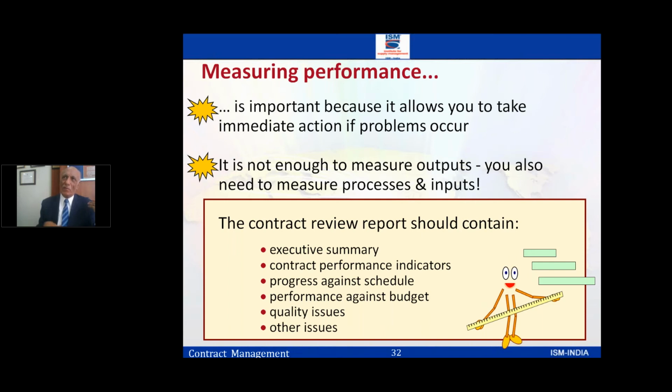So you need to have the performance indicators. Against those performance indicators, you need to measure how this guy is behaving in regard to the price rising up and down, in regard to the delay. The delivery was supposed to happen in 2 weeks, it happened in 4 weeks. Quality, I will look into all aspects, whether they were supposed to give us 20 pieces and the guy gave me 15 pieces. Some pieces came damaged. So all that performance part has to be measured. If you have not defined the performance indicators, you have nothing to compare with. So you need to measure it.